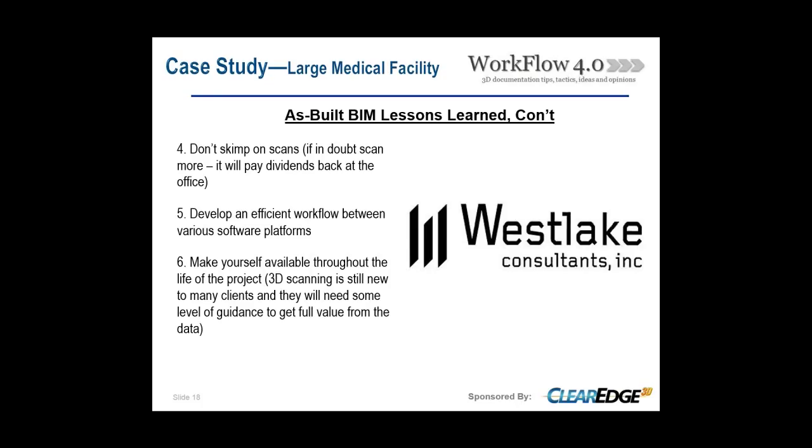Another thing, don't skimp on scans. I've never saved time or budget by shorting it in the field, because in the end it screws you on the back end in the office, and it ends up costing you double at that end. So don't skimp on scans. If in doubt, scan more.